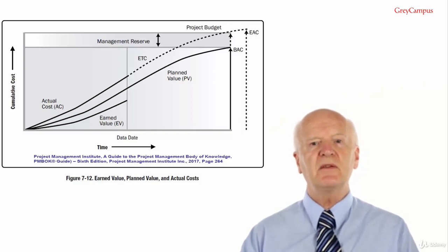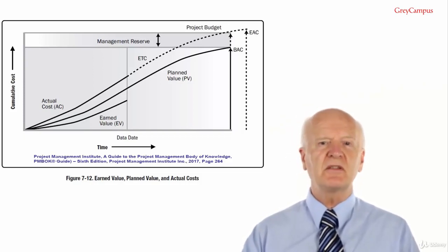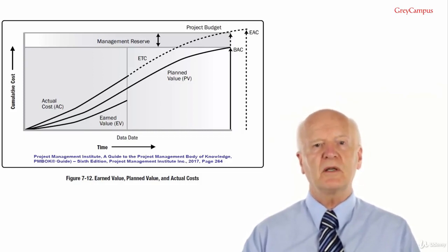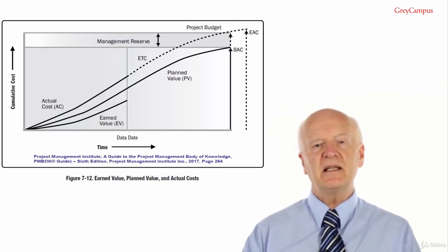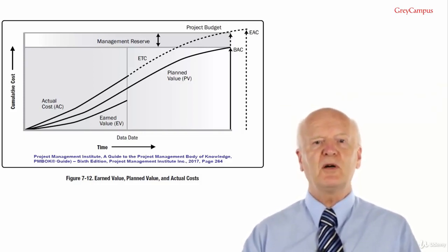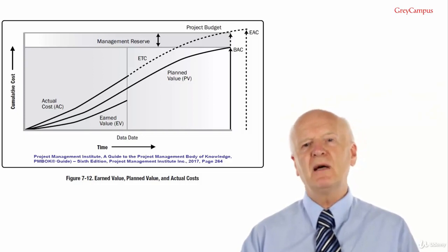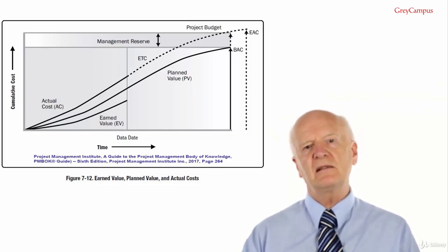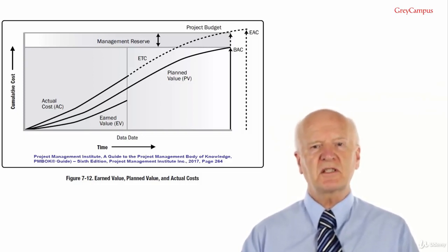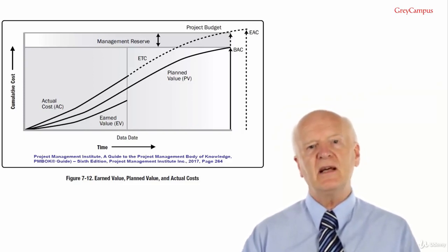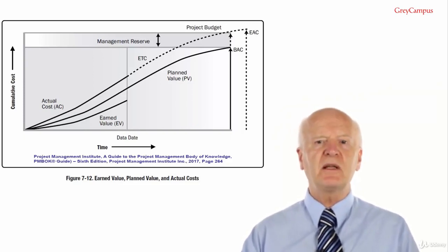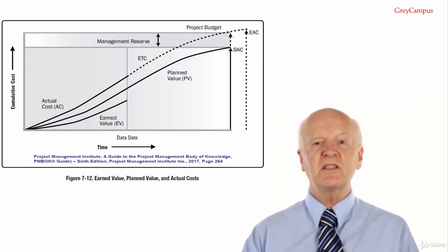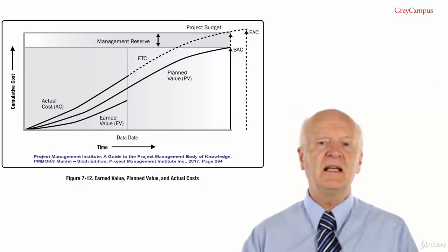This bottom-up EAC method builds upon the actual costs and experience incurred for the work completed and requires a new estimate to complete the remaining project work. The equation is EAC equals AC plus bottom-up ETC. The project manager's manual estimate to completion is quickly compared with a range of calculated EACs representing various risk scenarios. When calculating EAC values, the cumulative CPI and SPI values are typically used. The three most common methods are as follows, and this is from the PMBOK Guide, page 365.